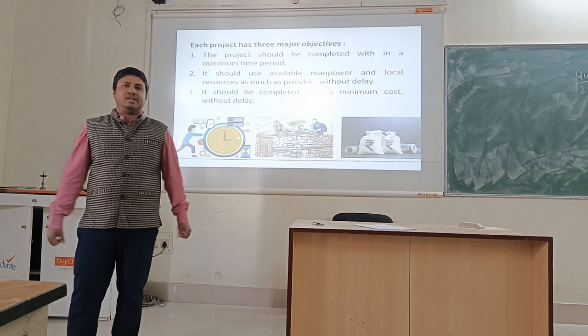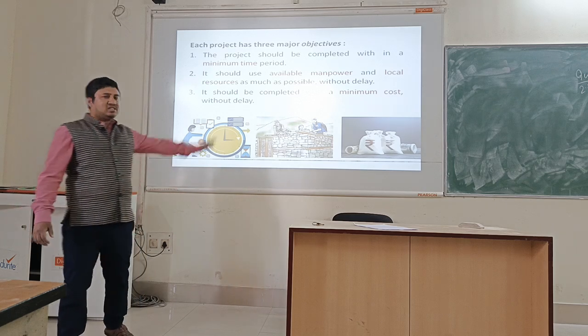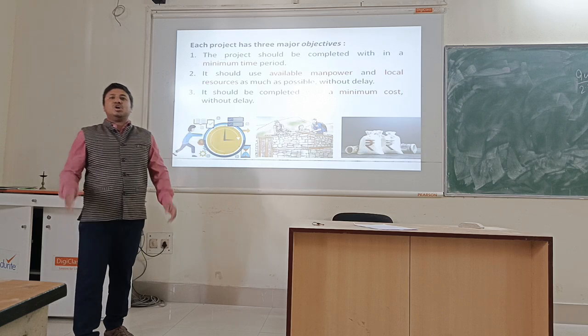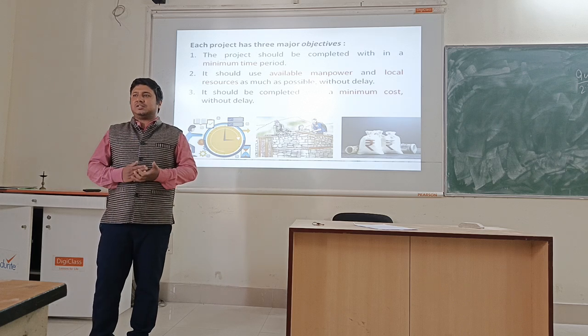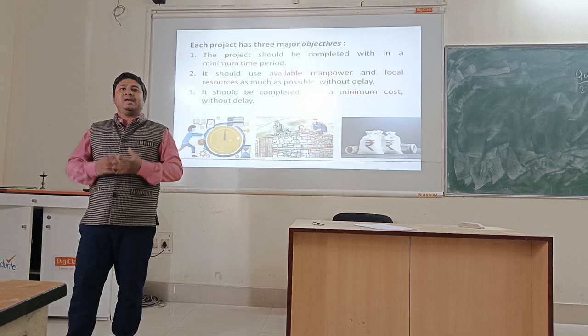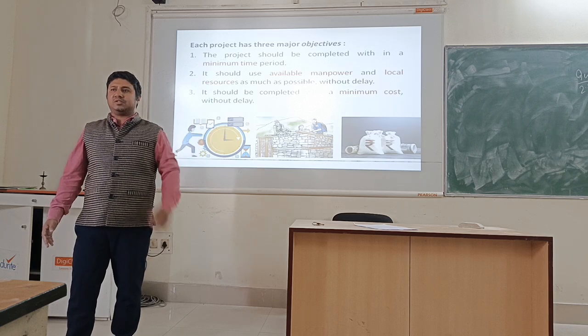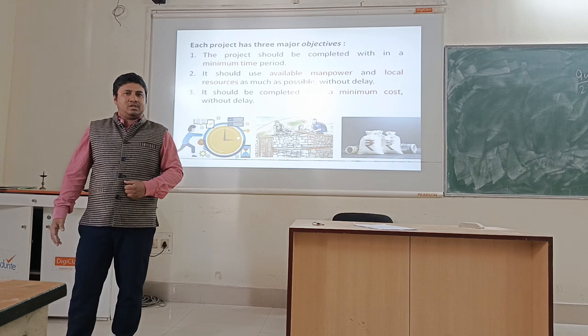The planning should be done keeping the uncertainties in mind. Next, to make the plan economical, we have to use local resources, local manpower, labor, and also local materials as much as possible. Why? If my construction materials are brought from a far place, there will be extra transportation cost.